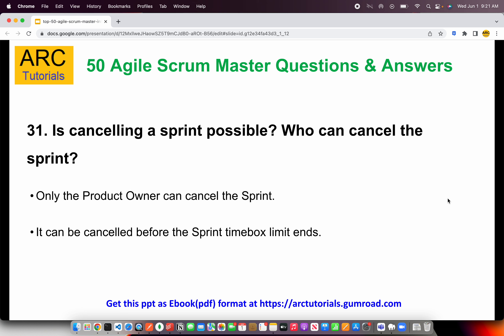A sprint can be canceled before the sprint time box limit ends. For example, let's say your sprint is starting in four days and the product owner comes back and says: due to a lot of holidays, state holidays, public holidays, or some team members are not available, or the backlog items are not ready, or there are impediments in terms of network dependency, licensing, etc. Only the product owner can cancel the sprint.